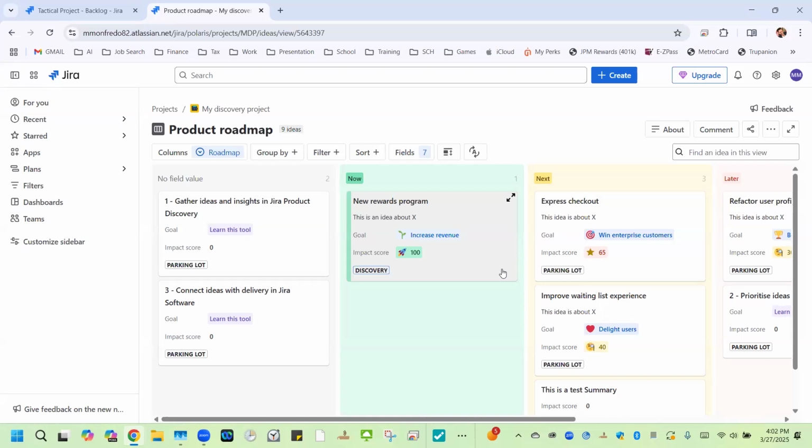Or maybe they have some sort of administrator or project person that's cleaning up their Jiras and not communicating with the team properly. So this is actually showing as being further along than it actually is. So those are two examples of how using the progress bar can potentially stop us from being on track from delivering this. In addition to it being a good visual cue of where this item is.